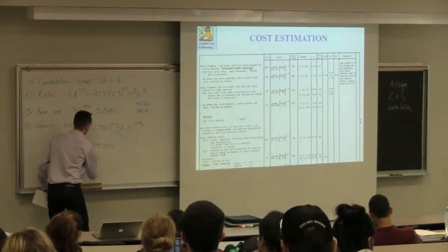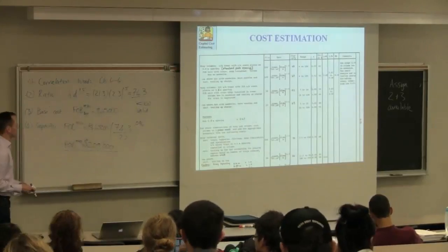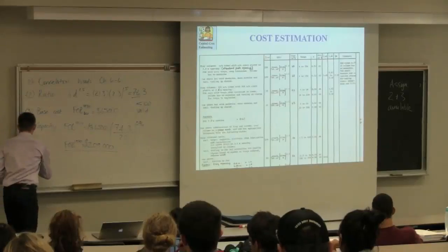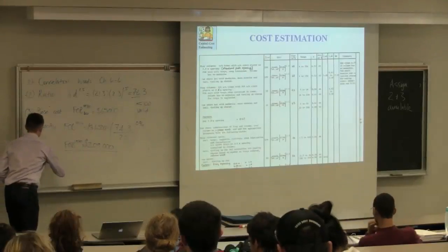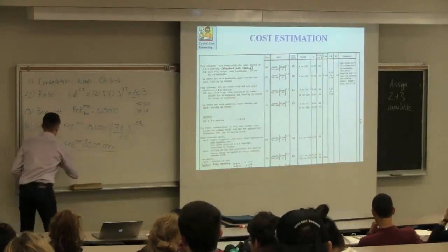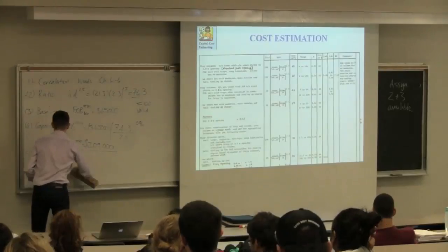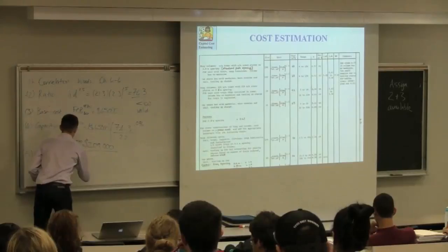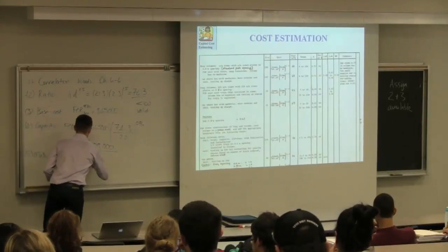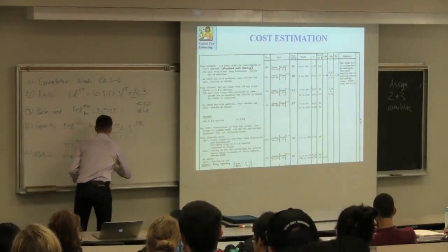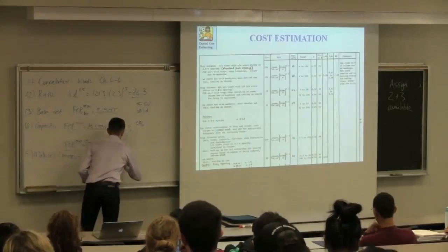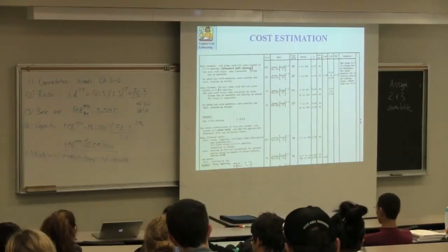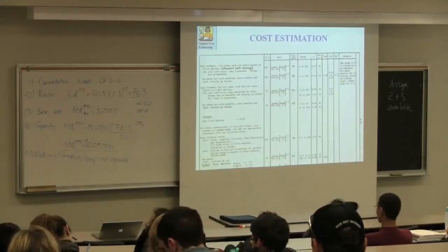So FOB Lane 2 in 1970 would be estimated here as 209,000. For step 5, we review the materials, pressure, and temperature. There's no adjustment required in this case. The base case is sufficient. Our first step for adjusting for that is not necessary. There's no incremental cost for that.